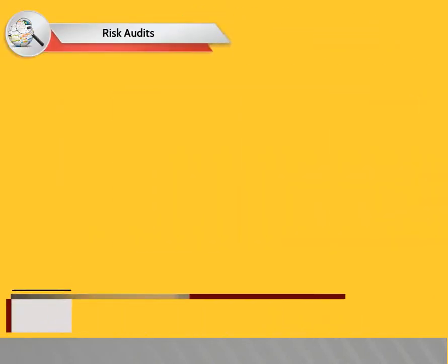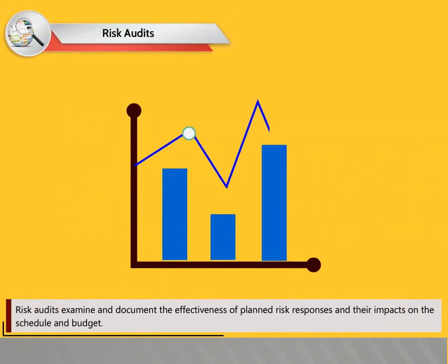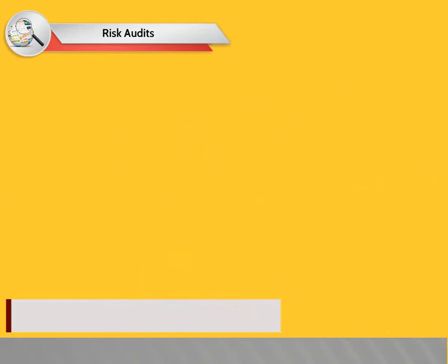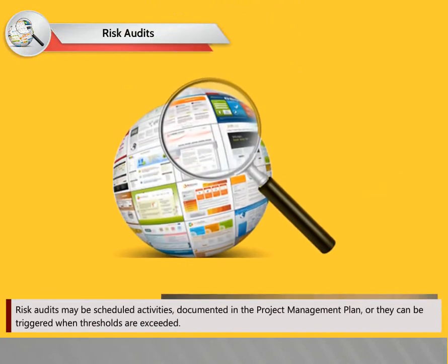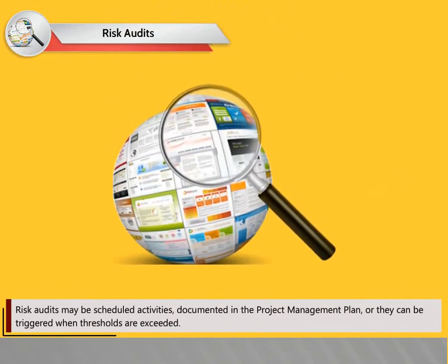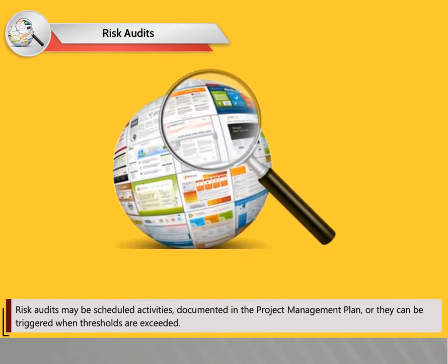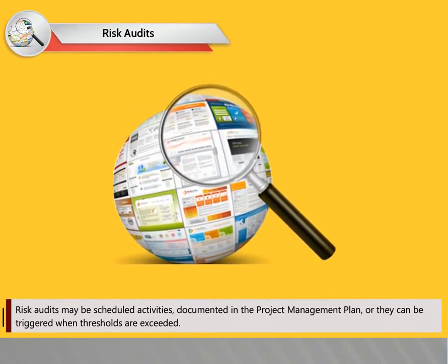Risk audits. Risk audits examine and document the effectiveness of planned risk responses and their impacts on the schedule and budget. Risk audits may be scheduled activities documented in the project management plan, or they can be triggered when thresholds are exceeded.